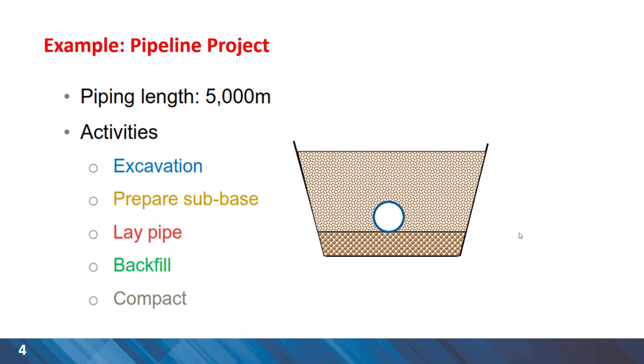Here is a pipeline project and the length for the project is 5 kilometers or 5,000 meters. There are five activities involved starting from excavation followed by preparing the subbase and laying pipes, backfilling and compaction.